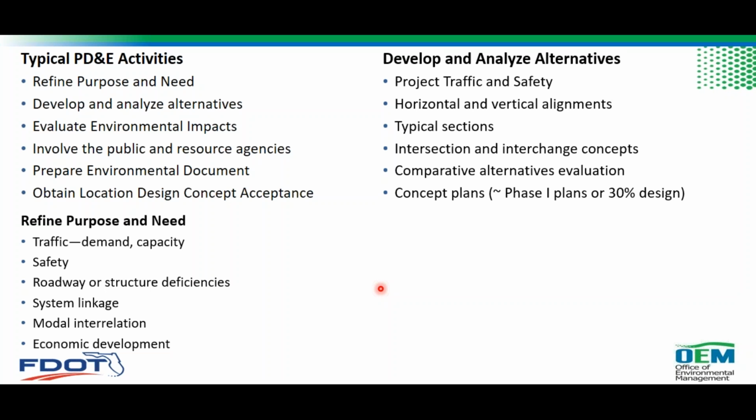Of course, we have to evaluate the no-build alternative regardless of whether it meets the purpose and need for the project. The goal for alternative analysis in PD&E is to develop concept plans to a level equivalent to phase 1 design plans, or 30% design.